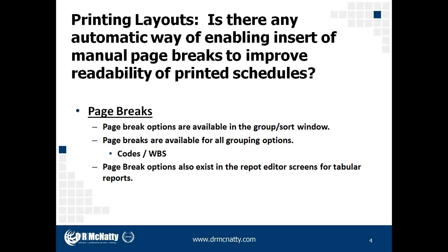Page breaks are going to be available options in two areas within P6. Number one, where we see them most commonly, is going to be in the group and sort options when we're in a P6 layout. And so we can group or page break by any of the grouping items that we have. And typically, these are going to be codes or WBS.